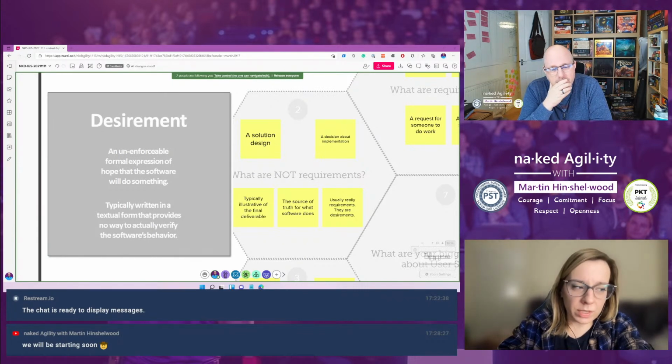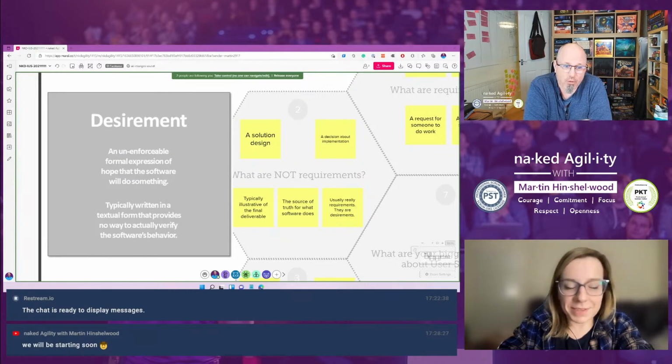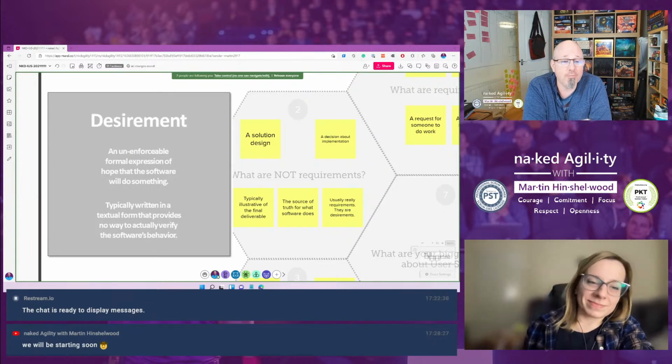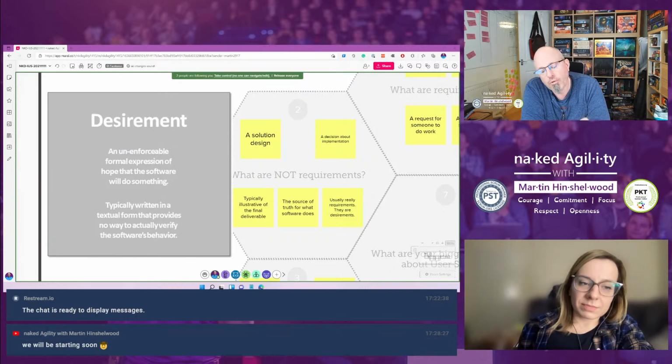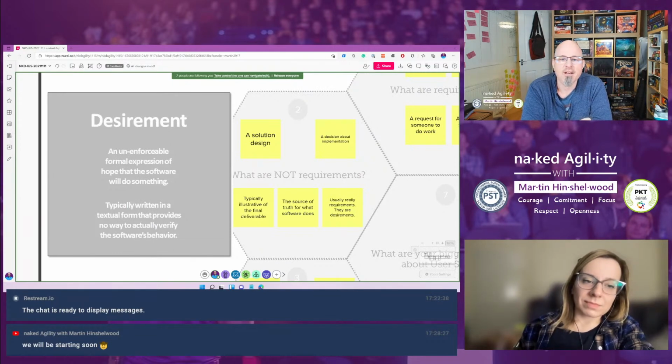Depends on the estimation with story points. If it's bigger than 8, then yeah, you should consider making 2, if you're doing story points. Story points are definitely a complementary practice, and some people love them and some people absolutely hate them and don't feel they have value. I'm a little bit in between. I've used both ways. I tend to track towards more of a Kanban strategy these days, but lots of people do still use story points.